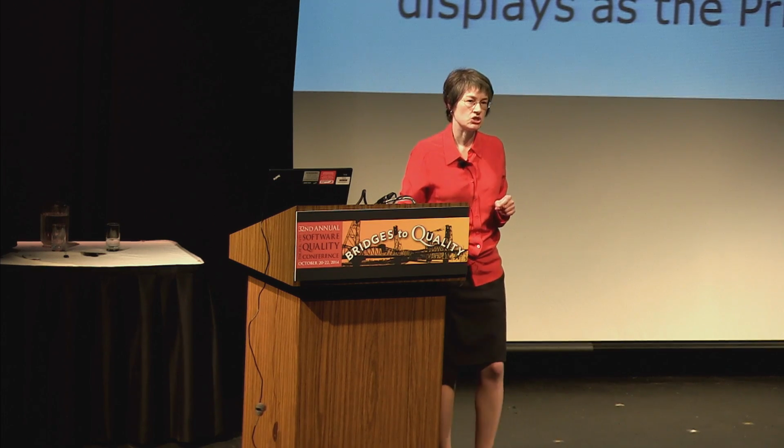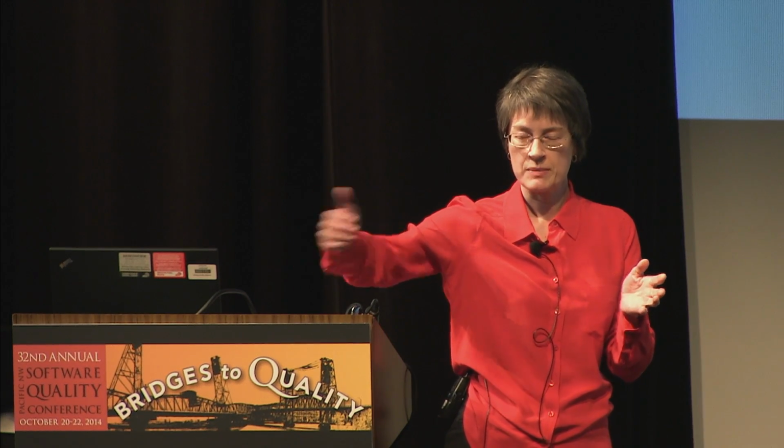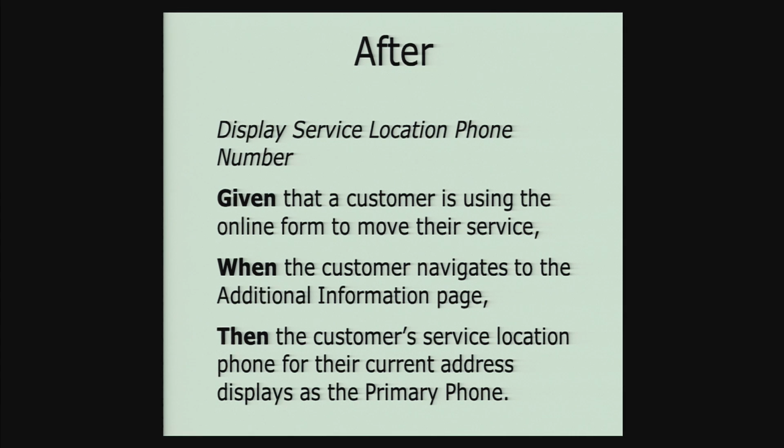The other thing that we didn't do is we didn't write the negative test cases. While the QA testers would take this as a starting point, they would then write those negative test scenarios. That was a conscious decision by the team, because I said, I can be writing this stuff for days if you want me to write an acceptance criterion for every single condition. And they said, let's write like the 80%, and then QA would flesh out the other stuff. Does that get to your question?